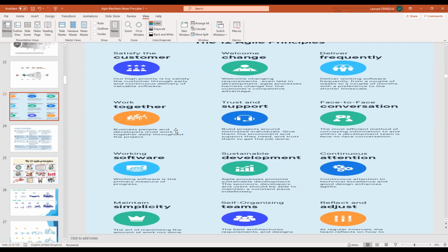When the requirement has been signed off, even one of the terminologies we are using there is that they say this requirement is baselined, it is frozen, as if it cannot be changed. So the development team does not want to change because after the requirement, they spend like 6 months doing design based on the requirement that has been signed off. So it's very annoying, time wasting and a waste of resources to change it. The development team will just tell you it's as per design, it's as per requirement.